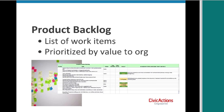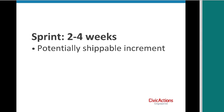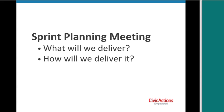The team takes some items off the top of the product backlog and focuses on completing that work in a two-to-four-week sprint. At the end of that sprint, what you're shooting for is a potentially shippable increment of the product — working software. At the beginning of the sprint, you have a sprint planning meeting where the product owner and the team decide together what they will deliver in, say, two weeks, and how they will deliver it. The list of work is frozen at that point — you don't shift things in and out of the sprint.